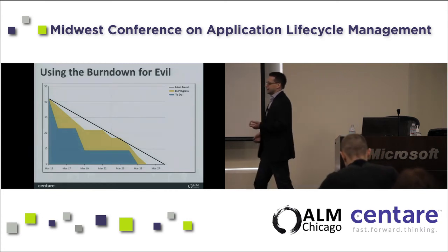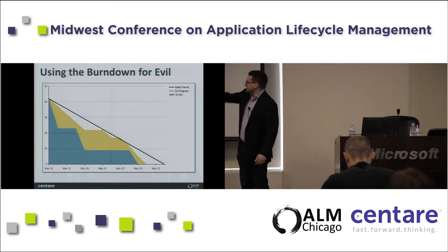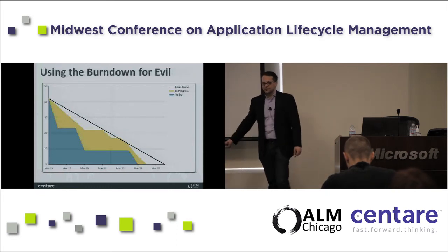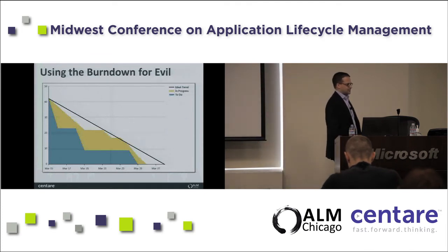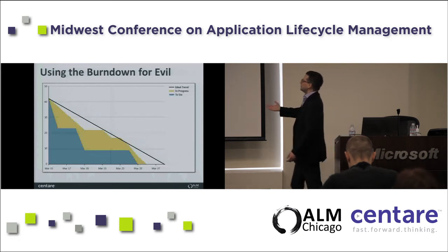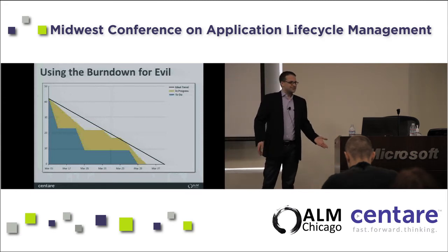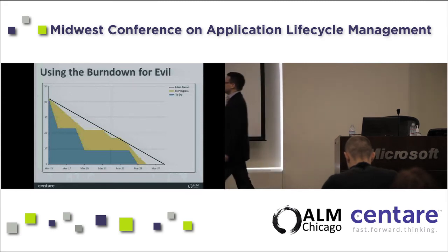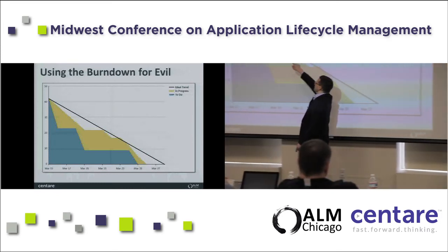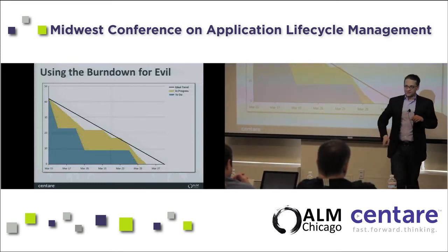So if you're looking at the Burndown chart, which you would still probably want to have if you're an Agile team under Waterfall, you've got this nice ideal trend line for where you're supposed to be in your sprint. So this particular one, you spend most of the time under that line, so you're ahead of schedule. It doesn't usually look that way, does it? Usually, at least for a while, we're on top of that ideal trend line and we're out for a little while and then maybe it corrects.